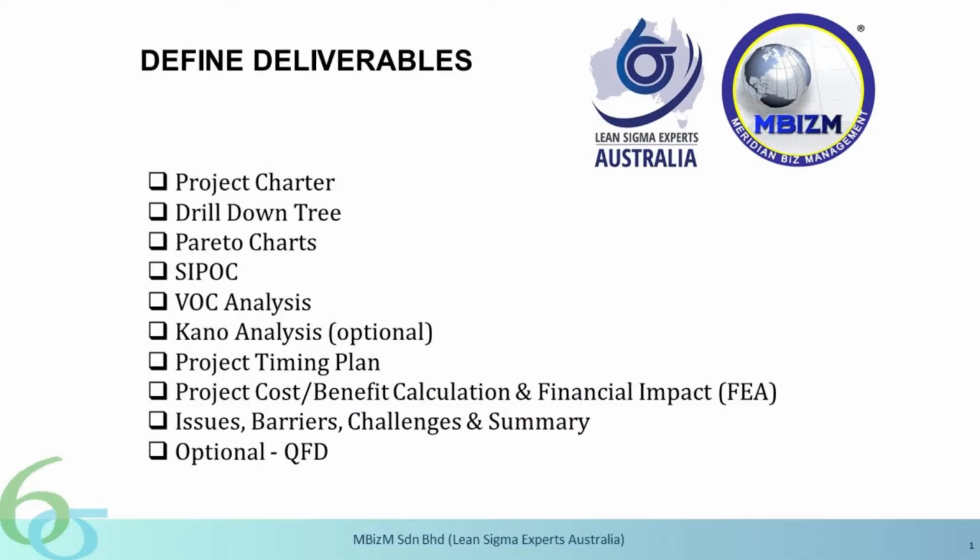In the order of the tools that are applied, not necessarily as shown in the slide earlier, you can start with any of the tools that you think is suitable for the particular project. Normally what I would do is start with the project charter first, just to get a draft charter. That means I'll have a project title, goals, the scope of the project, and so on done.